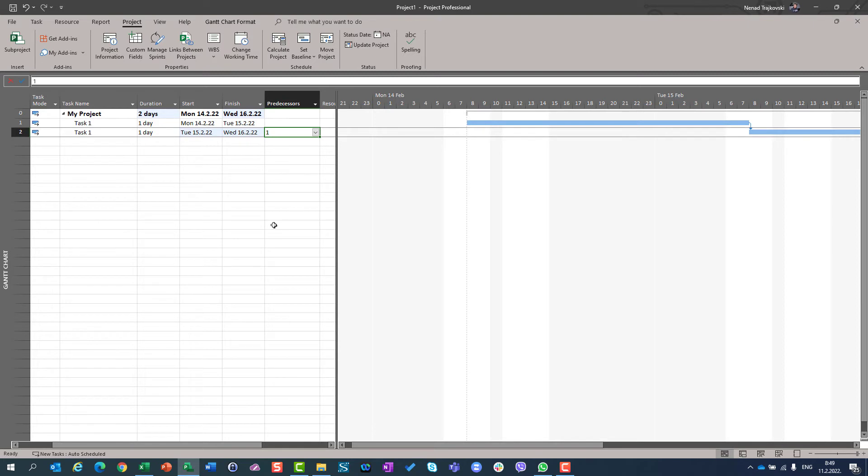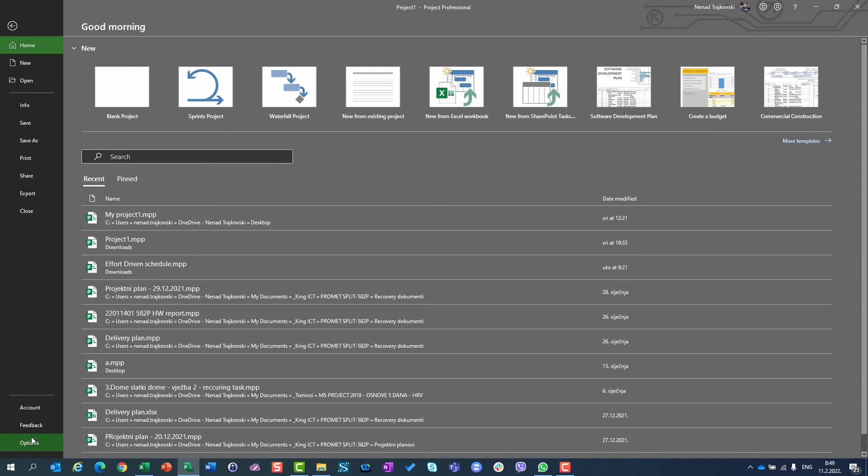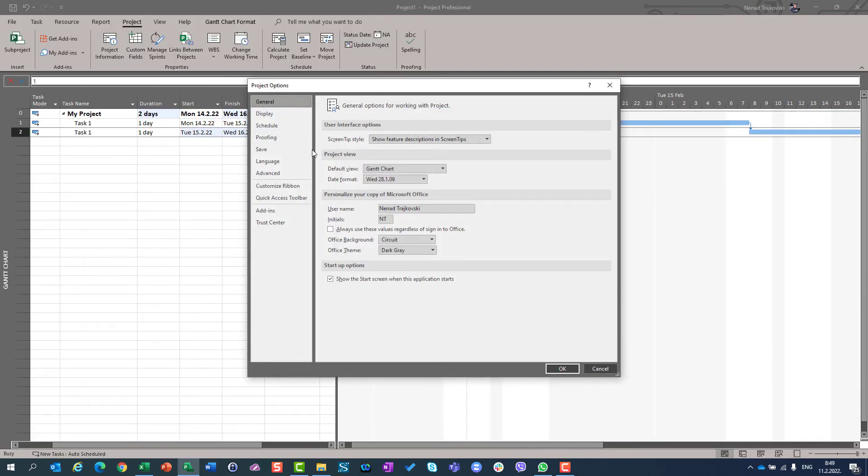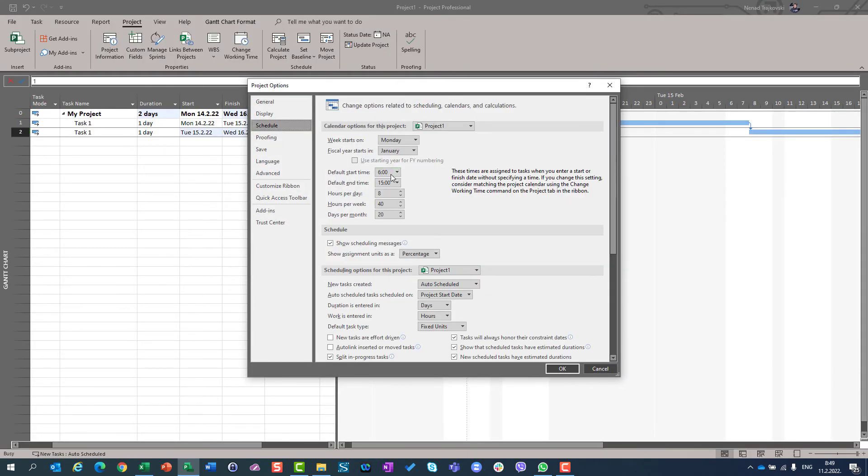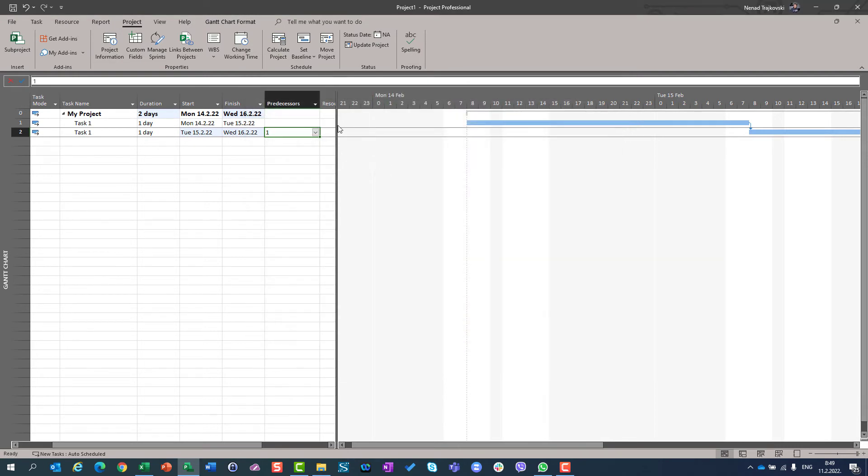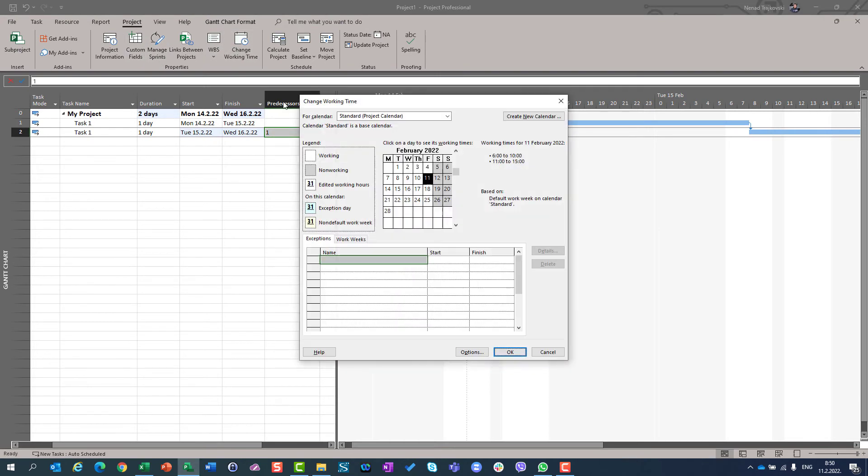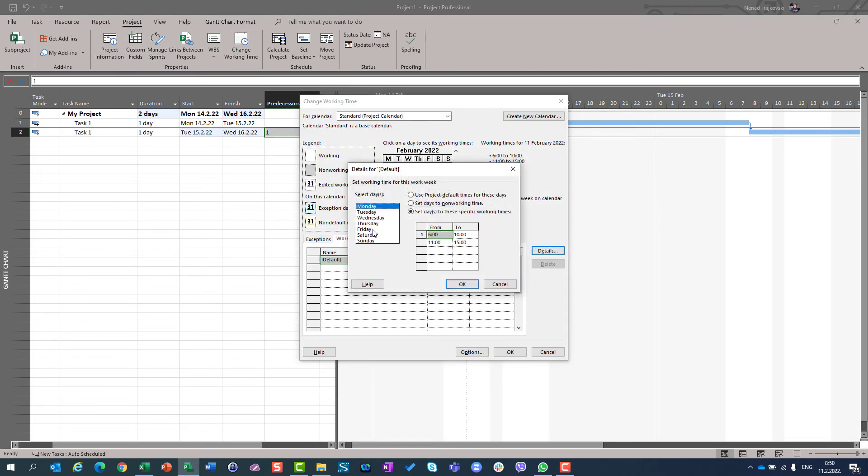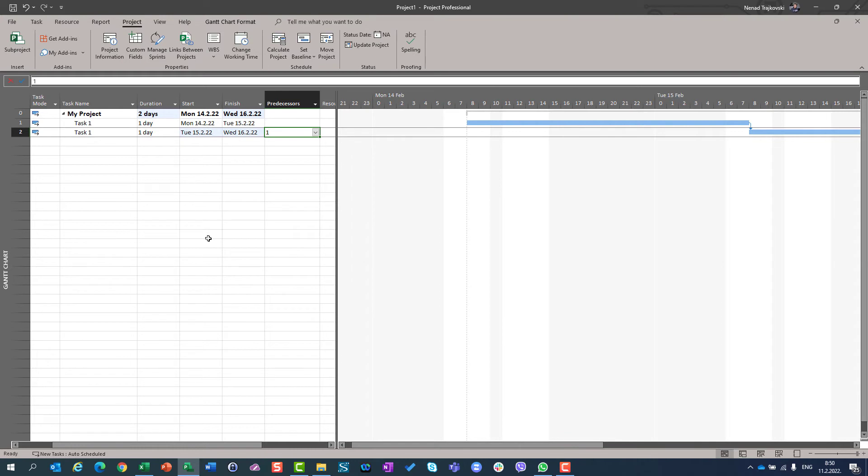So, you don't want to do that. Because your schedule is set up and each and every task is supposed to start exactly at 6am. What can you do? So, now the tip is coming. If you have here in file options schedule working time with default start time before 8am, you should also have a calendar aligned to that. So, those working days are before 8am.